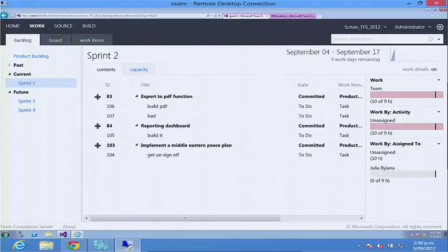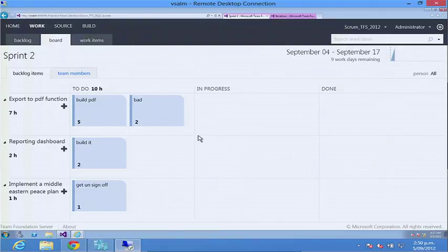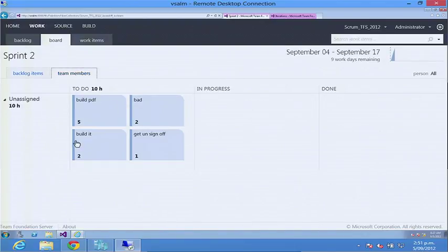how we do that. So now we're going to move to a board view, right? This is what we're used to seeing in lots of other agile tools. It's giving me 2 roll-ups of numbers. I've got a to-do total, so all the tasks in the to-do state, as well as a roll-up by each feature. So there's 7 hours to do this feature in total, so on and so on. And I can pivot that across team members. So right now they're all unassigned, but if I had Julia who was doing something, I'd see her as a line in here. So I can see, task hog guy. There's always one, right? Who turns in at day 1 of the sprint and says, I'll do these 10, see you in 2 weeks. And you never see him until he comes at the end and says, I didn't finish any. And so you can just watch for task hog guy and say, I don't think so.